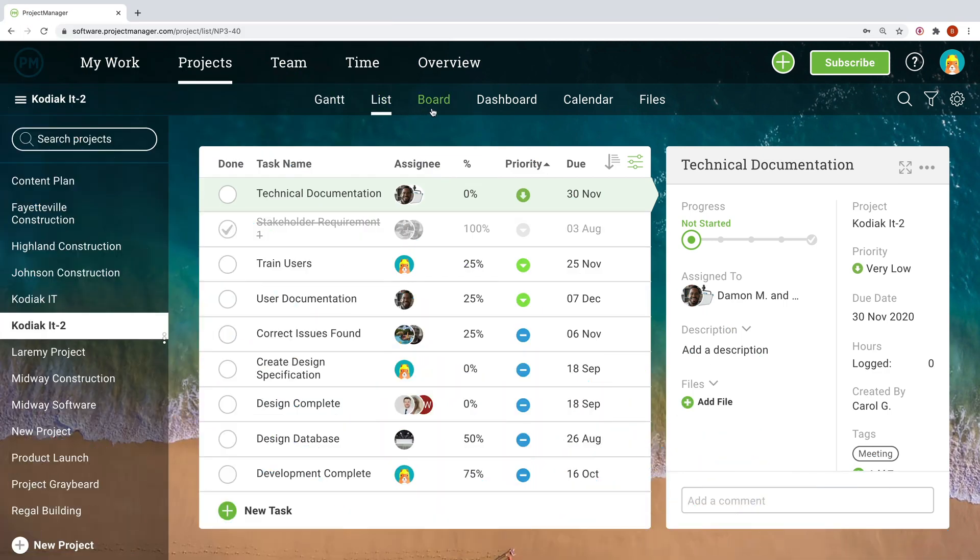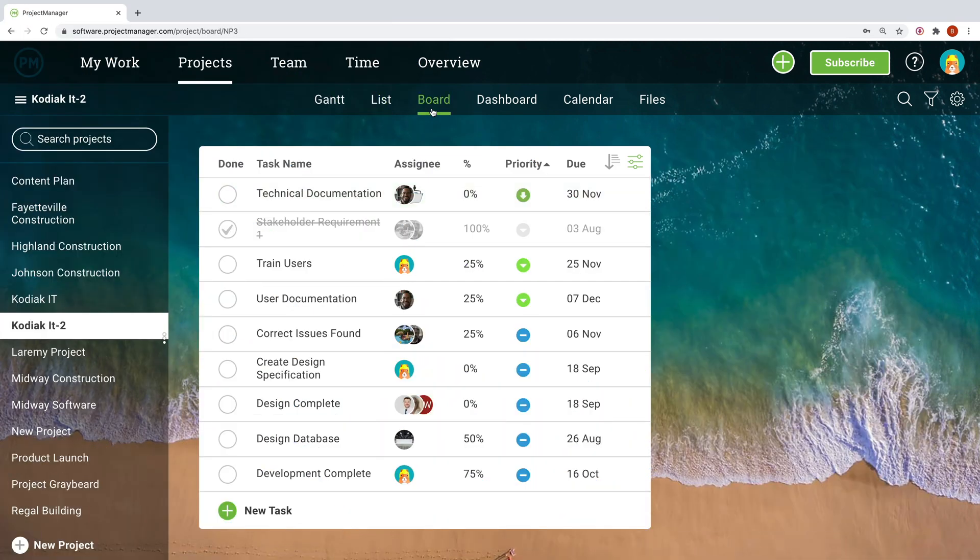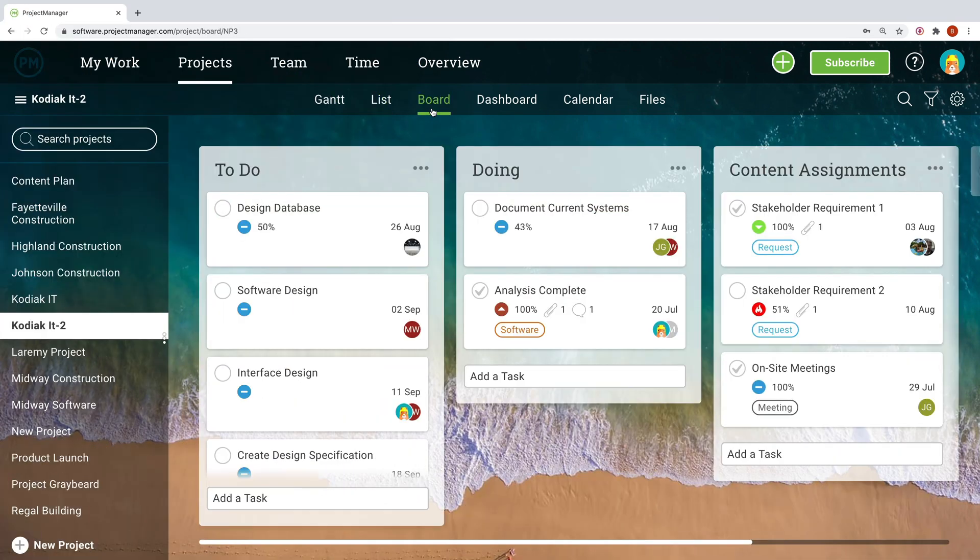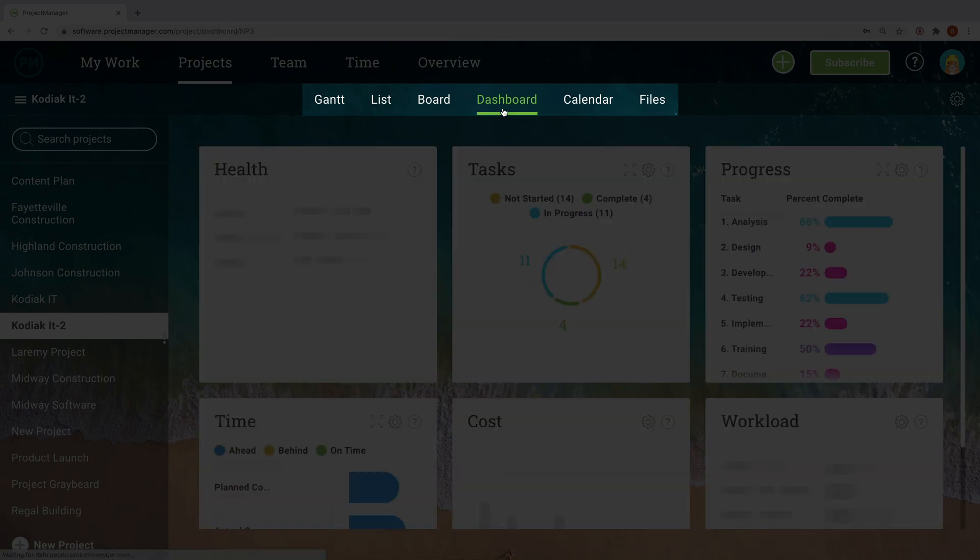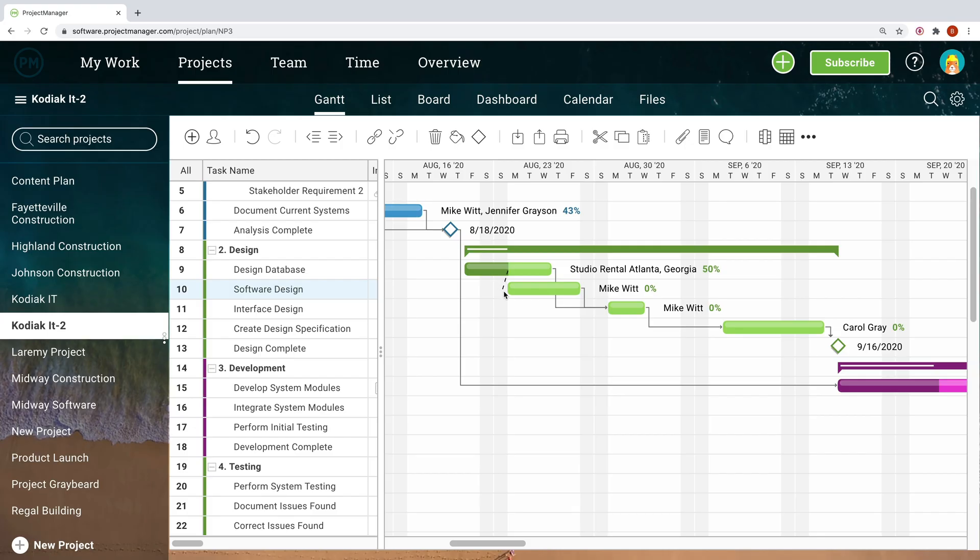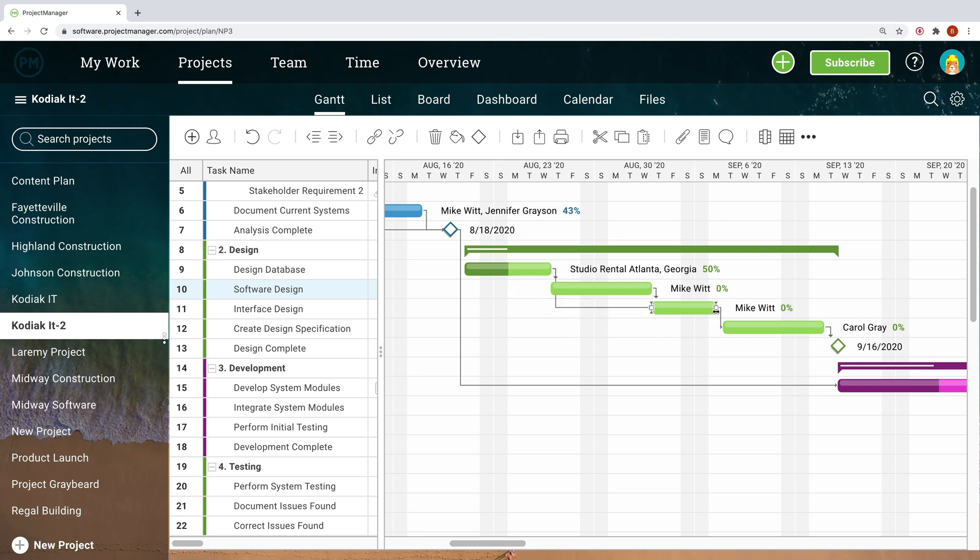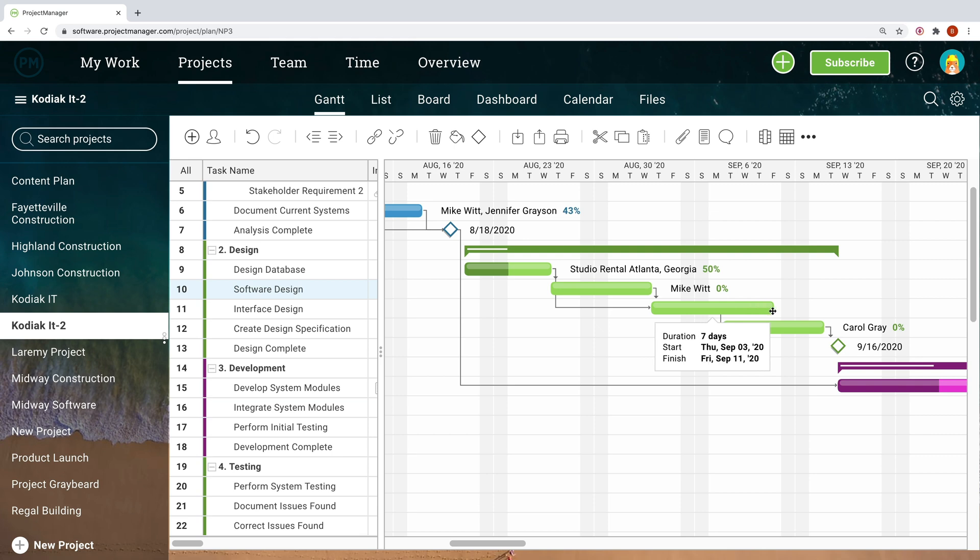Good project management starts with planning and our software has multiple project views to help you lay out the roadmap for success. Map out projects on the Gantt chart and see how they unfold over time, taking into account task dependencies and milestones. This provides a clear picture of the critical path towards your goal.